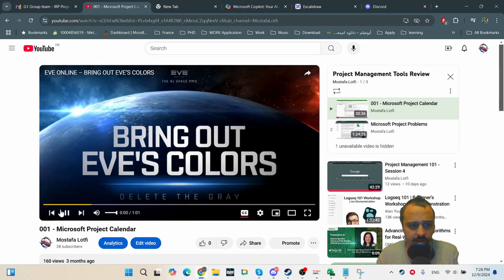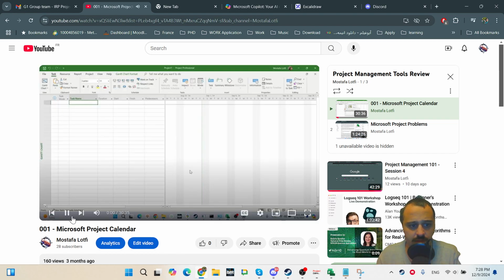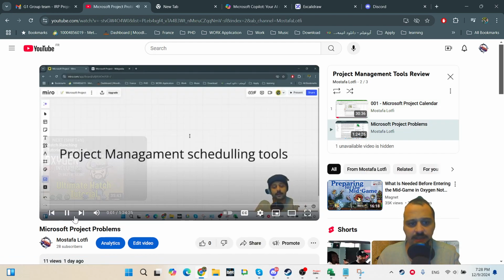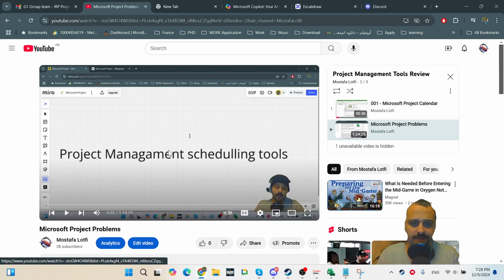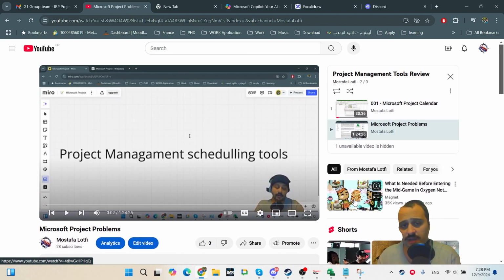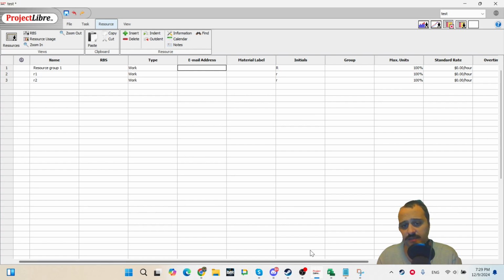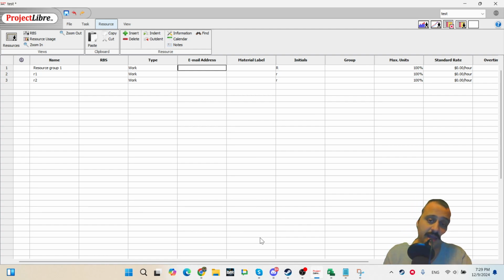and I think not this one, project calendar, Microsoft Project problems. In this video you will see why I'm saying you should not use resource cost, and I also explained this point in my other videos regarding earned value. Basically I'm saying this because Microsoft Project is not considering the resource cost part of earned value calculation. It's a really big bug and it has existed in Microsoft Project for many years.